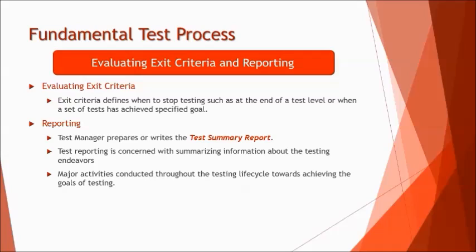So evaluating exit criteria, where I told you about exit criteria being the checklist which defines whether we can stop testing now or not. It's basically a thoroughness measure of what coverage you have done. Are there any residual defects or residual risk remaining? Or you talk about the budget allocated to you. If you run out of the budget or the time, you have to stop testing.